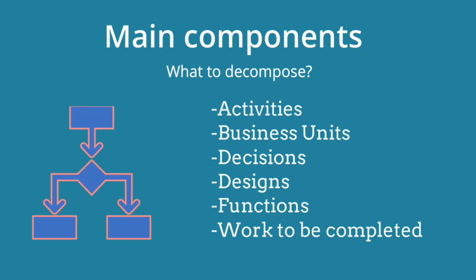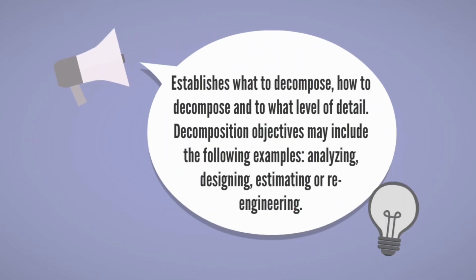Functions, to allow the function to be better understood for optimization. Work to be completed, work breakdown structure, WBS, to allow activities, tasks and deliverables to be established or estimated. Decomposition reason establishes what to decompose, how to decompose, and to what level of detail.